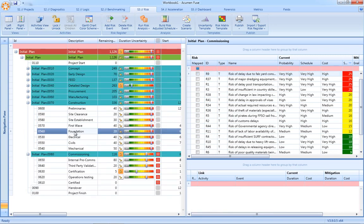In addition to mapping risk events to groups of activities, you can also map single risks to specific activities within the schedule.